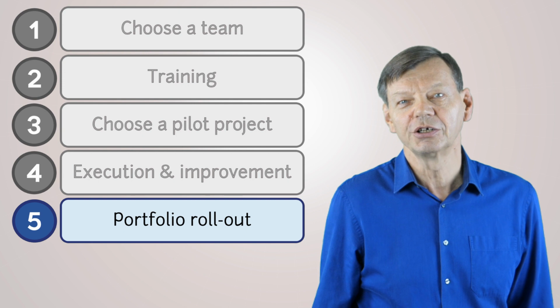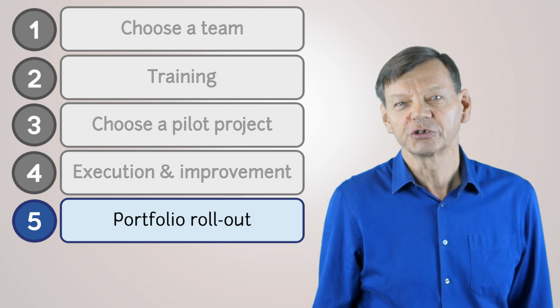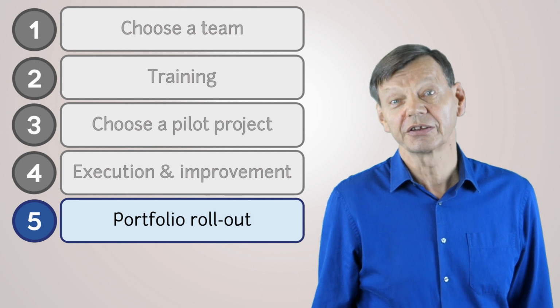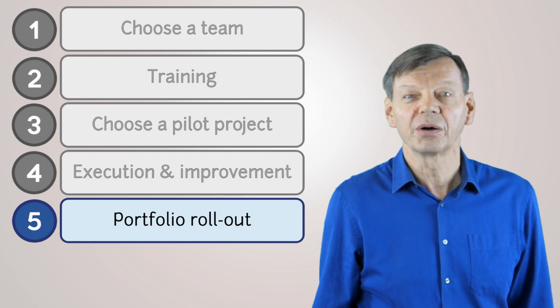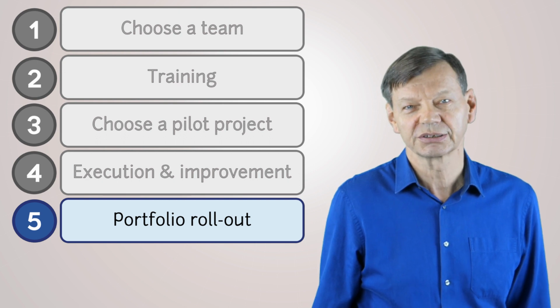Be careful to maintain a low level of work in progress, not too many simultaneous projects. To reduce the level of work in progress, you can either freeze some of the projects or apply the 2-for-1 rule. You only start a new project when you've finished 2 projects.